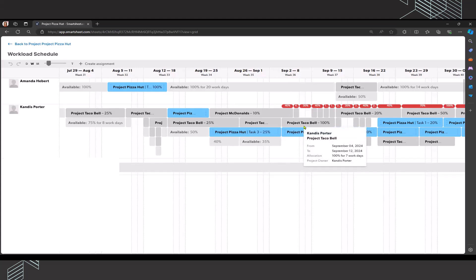This is going to give us a really great tool, the workload schedule, because we're really quickly going to be able to see who is over allocated, during which dates, are there other resources that we could shift some of that work to. The key, however, is that you're going to need to be very clear on all of the projects that each of the resources are working on.